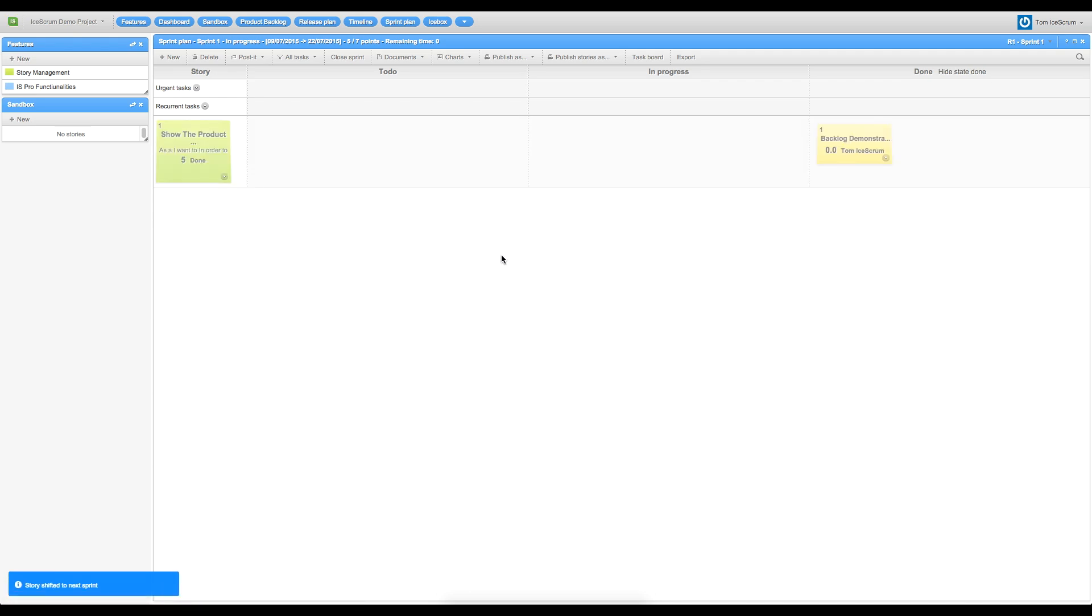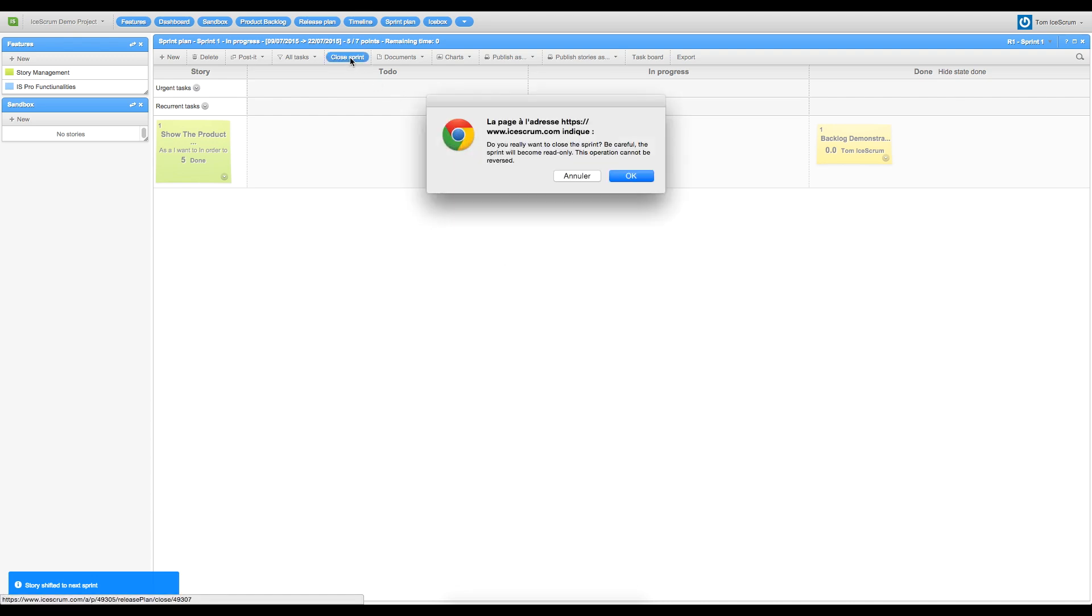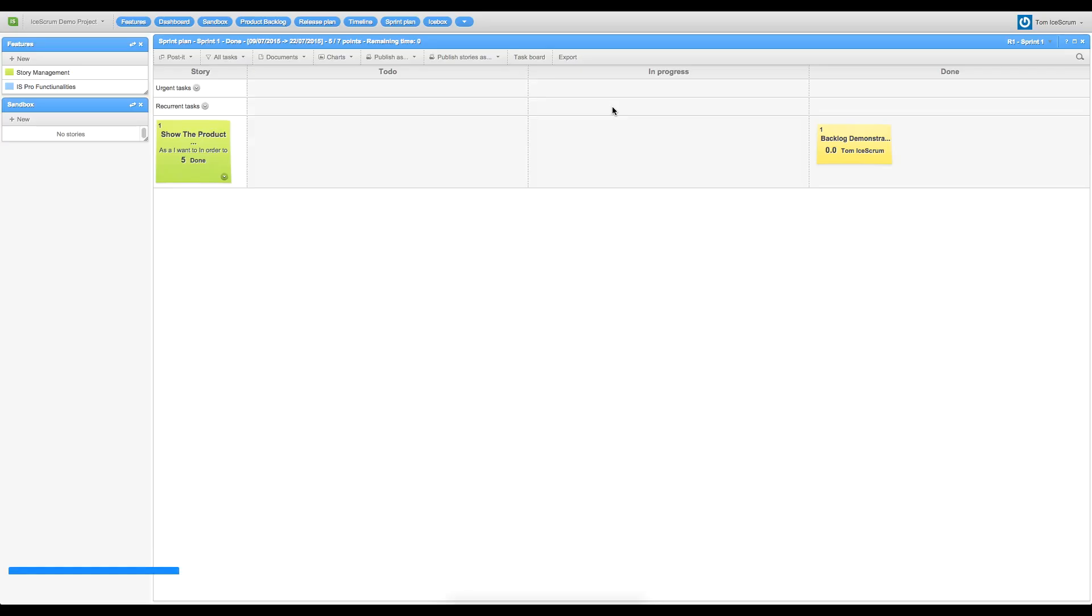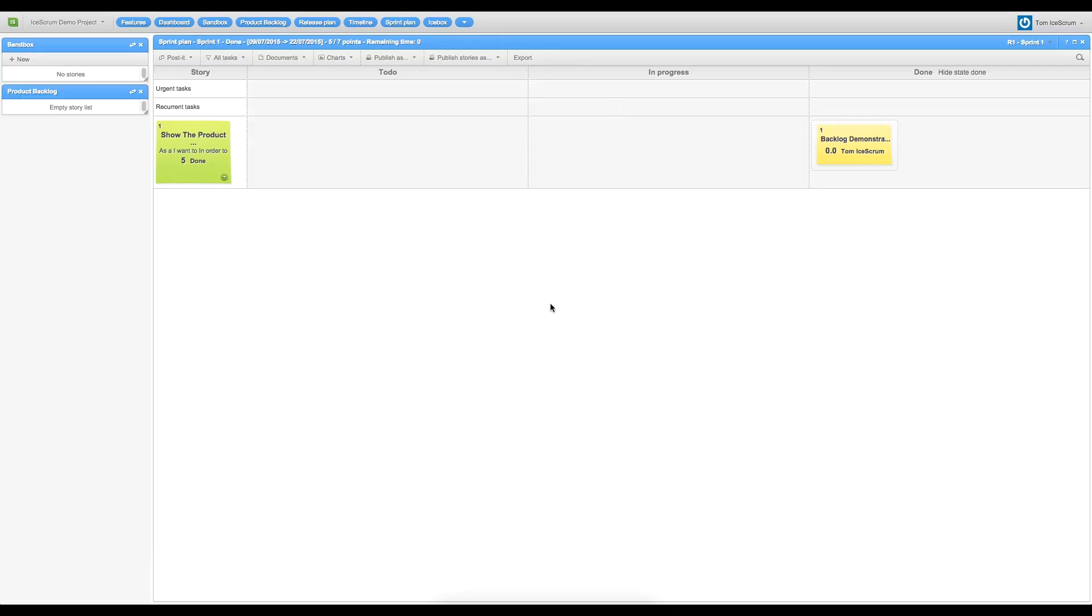I can now close my sprint 1 and start sprint 2. The first sprint is now closed. We can move to the next sprint just by refreshing the page.